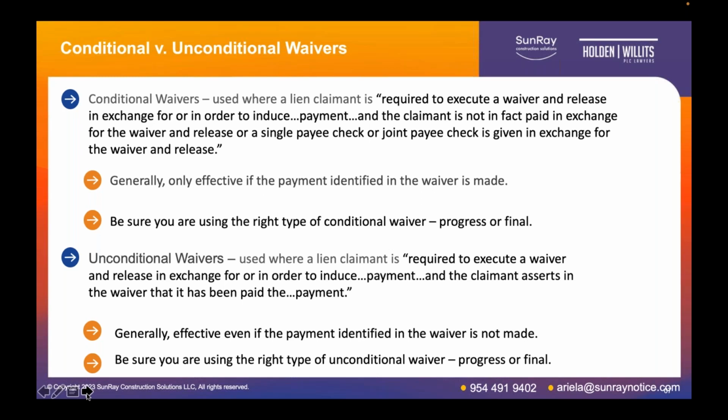And we'll talk about this more in the do's and don'ts, but one of the big things, and it's an issue that unfortunately is quite common in the industry, is parties demanding signing unconditional waivers, either progress or final, in exchange for delivery of a check.